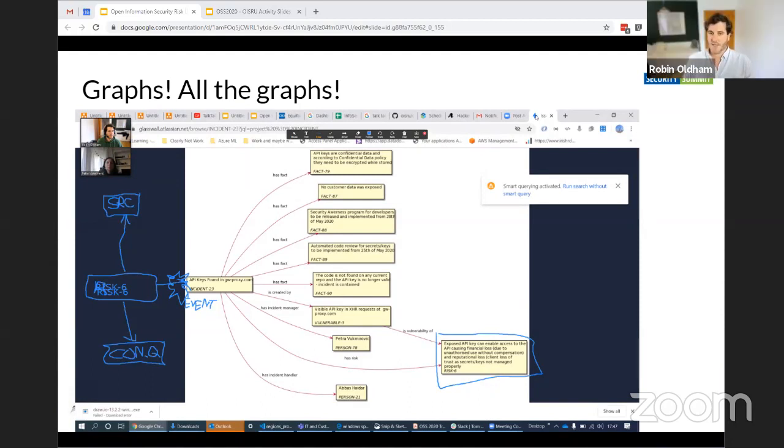I was going to say, not to labor the point too much, but I think this was a really interesting bit where we were talking about how in project management terms you have risks and issues, and in InfoSec we have risks and incidents, and really an incident is the manifestation, the realization of a risk. So by considering them as two sides of the same coin, you could start drawing up a lot here.